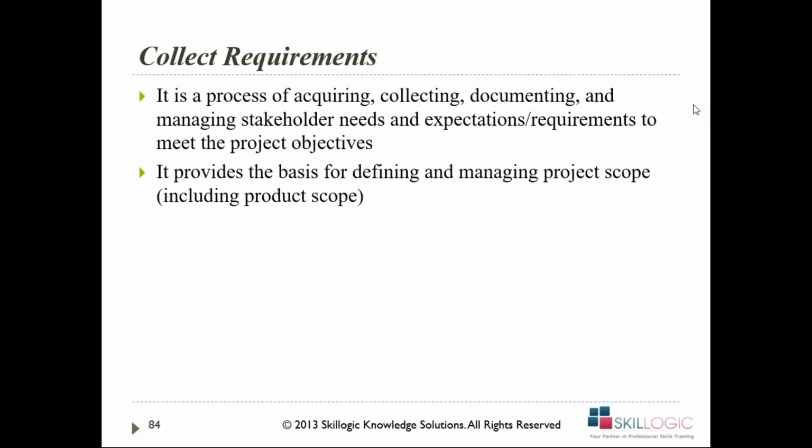What is Delphi? Now, this is one of the PMP questions which often comes in the examination. What is Delphi? Always remember, Delphi is nothing but when you send out a survey to your stakeholders and they are able to respond to it anonymously. Anonymously is the keyword. When they're able to respond to it anonymously, that becomes your Delphi technique. As a group, you can do the discussions, may come up with the decisions. You can send out the surveys or the questionnaire. What is the difference between surveys and questionnaire to the Delphi technique? Surveys and questionnaires might not be anonymous. You might still be able to gather the name of who has given you the details.